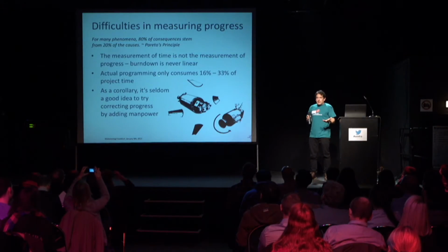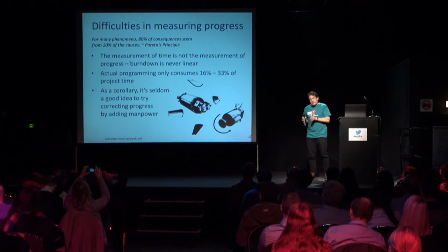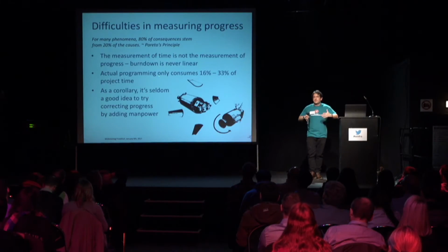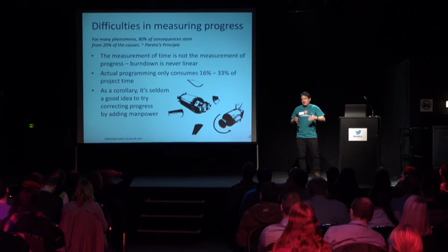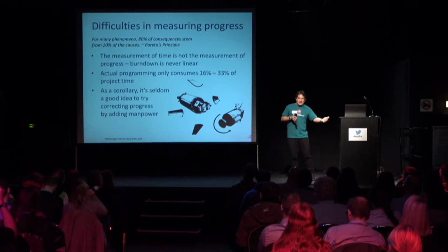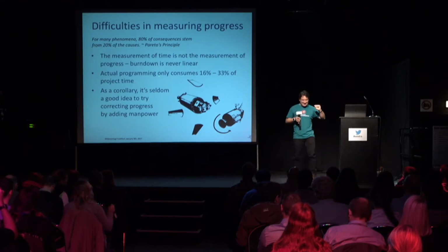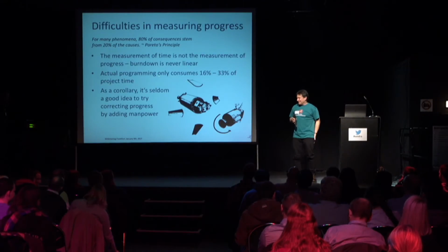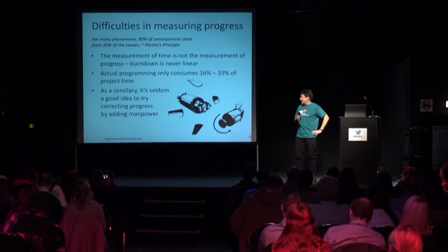Actual programming in any project will only consume about 16 to 33% of the time. Everything else is, well, project management, design, user experience, architecture. It's not overhead, but it's a necessary evil, speaking as a developer. Obviously, opinions will differ on that one.